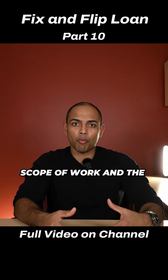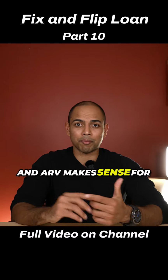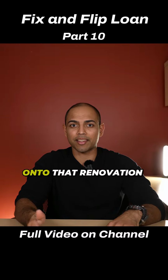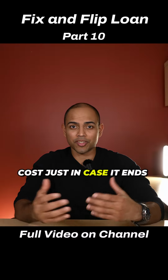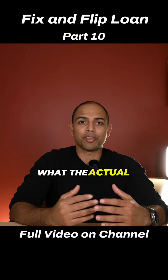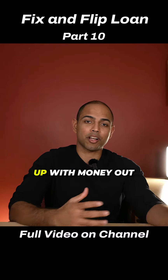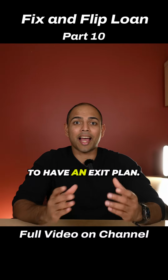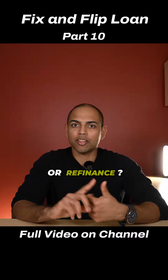Once you complete the scope of work and the purchase price and ARV makes sense for you, it's very important to add another 5 to 10% onto that renovation cost, just in case it ends up being more. There's been a few times where people underestimate what the actual renovation will cost and then have to come up with money out of pocket or figure out an exit plan. And it's very important to have an exit plan. Are you planning to sell or refinance?